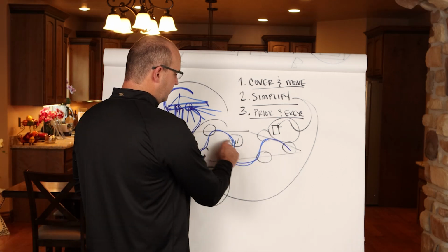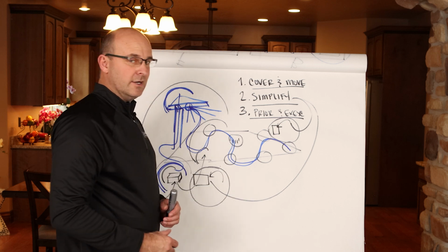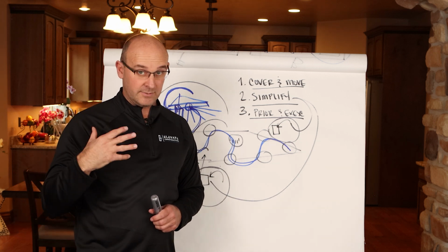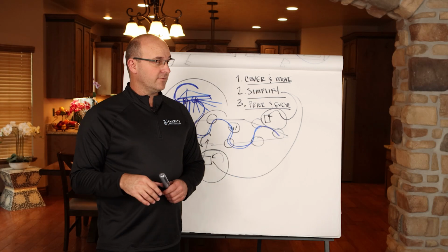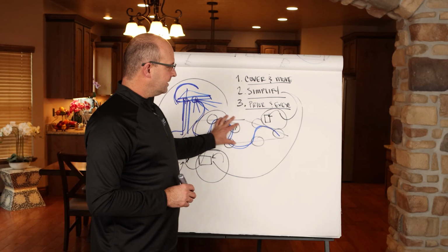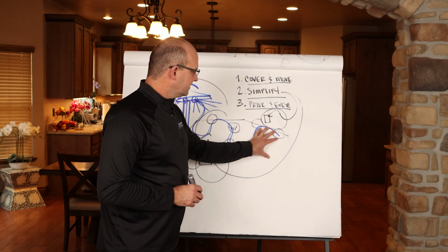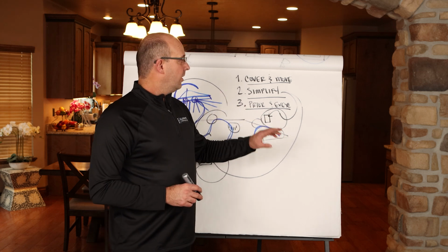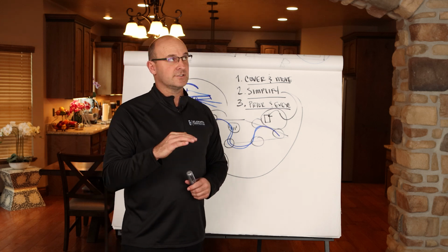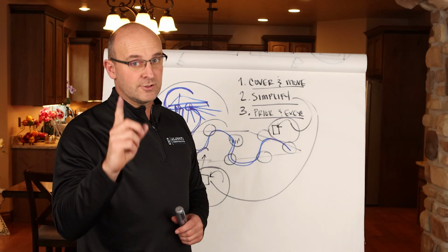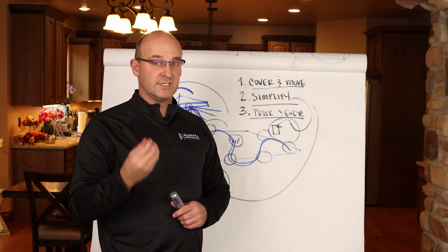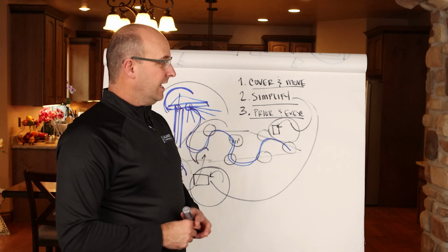Each individual crew and person and functional area will want their own resources. Gimme, gimme, gimme, gimme. We'll want all the labor. Gimme, gimme, gimme, right? By human nature, they're not evil people to hog everything. And it's the field commander's job to make sure that resources, materials, and logistical systems are prioritizing and executing the most important things on the project. According to your trade bottleneck, your zone bottleneck, and your overall project bottleneck, which is your most limiting factor. And that is key.